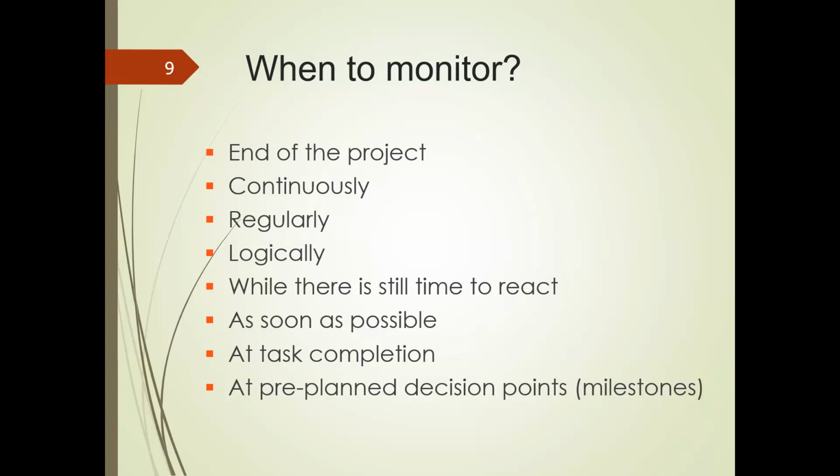It is completely the project head's or project team leader's decision. But if the top management wants to continuously know what is happening in the project, sometimes even on a daily basis, for a smaller project that gets over within a maximum of 2 or 3 months, the management may require feedback from the project team daily. If it is a longer project, for 1 year, 2 years or 5 years, you can have a timeline or milestones and report that information.